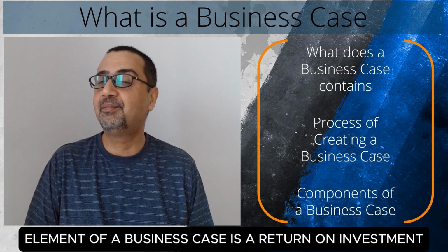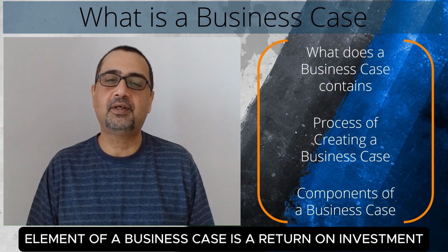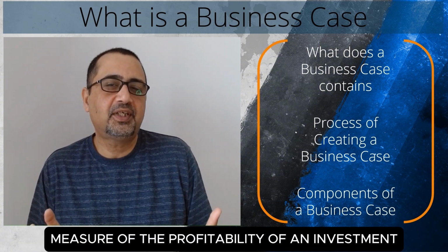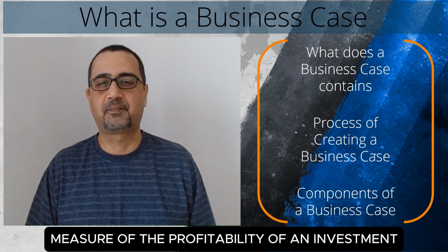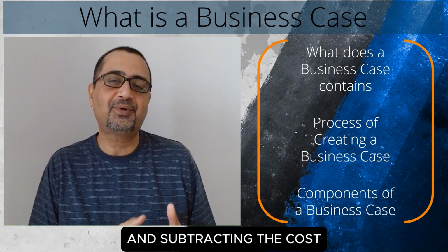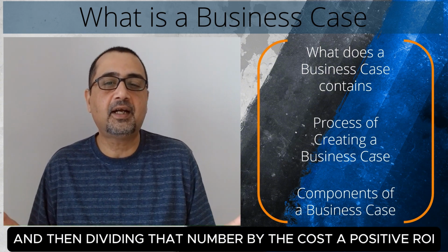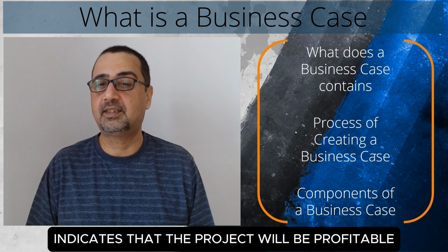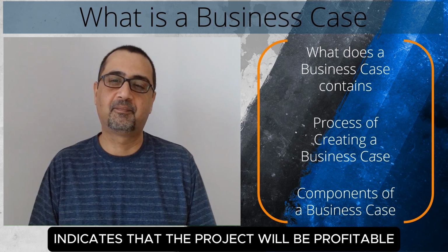Another important element of a business case is a return on investment, ROI, analysis, which is a measure of the profitability of an investment. ROI is calculated by taking the benefits of the project and subtracting the costs and then dividing that number by the costs. A positive ROI indicates that the project will be profitable.